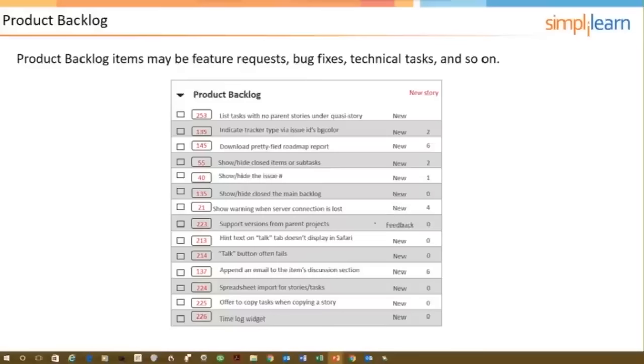That's a given. Does the product owner create all the user stories for the product backlog in isolation? No, absolutely not, because there are technical considerations that the product owner might not even consider. The product owner's perspective is more the customer side, the end user side. And so the product owner might not even think of things like security or architecture-related things, and there might even be user stories that come from the technical domain that need to be developed before some of the product owner's user stories.